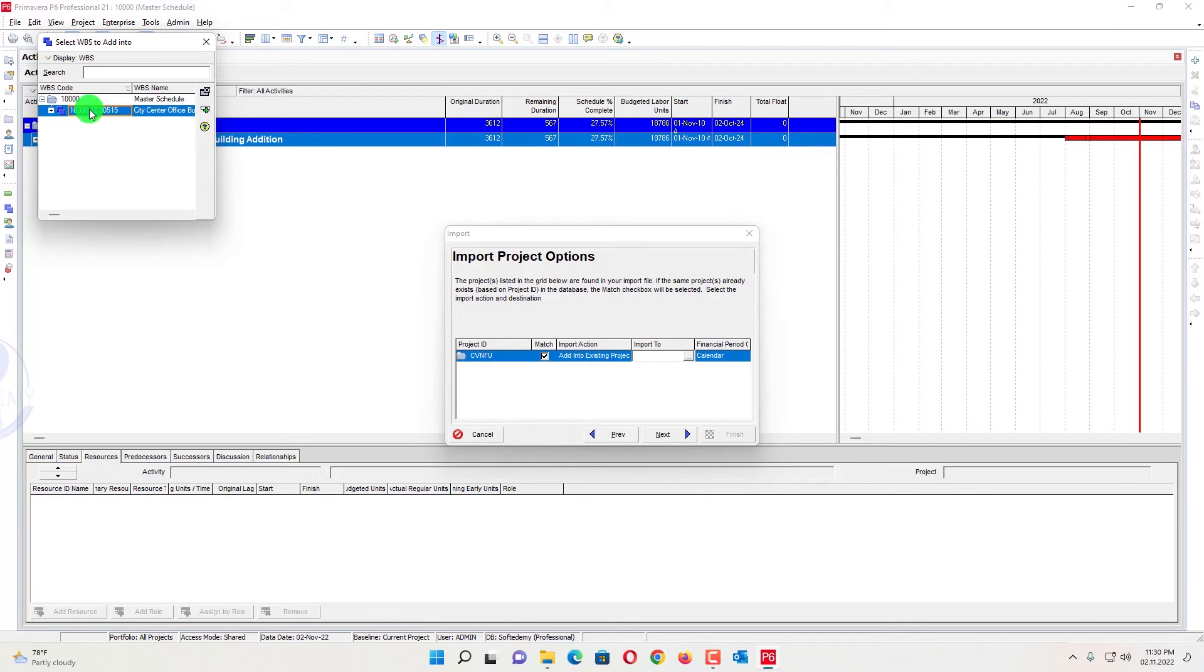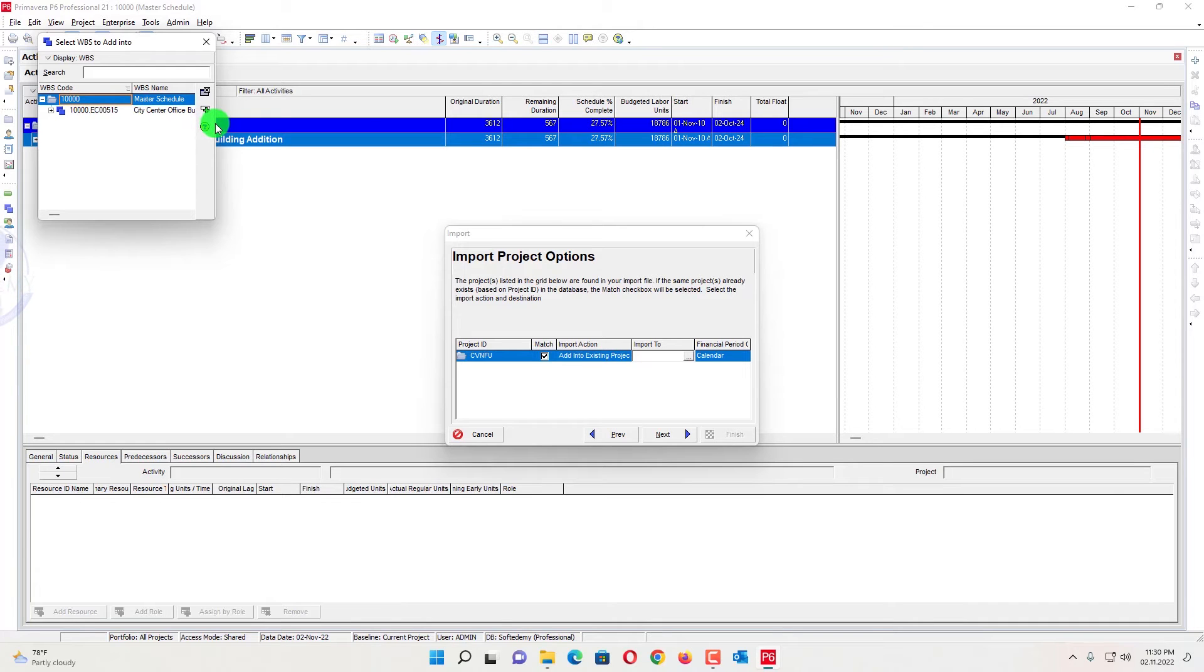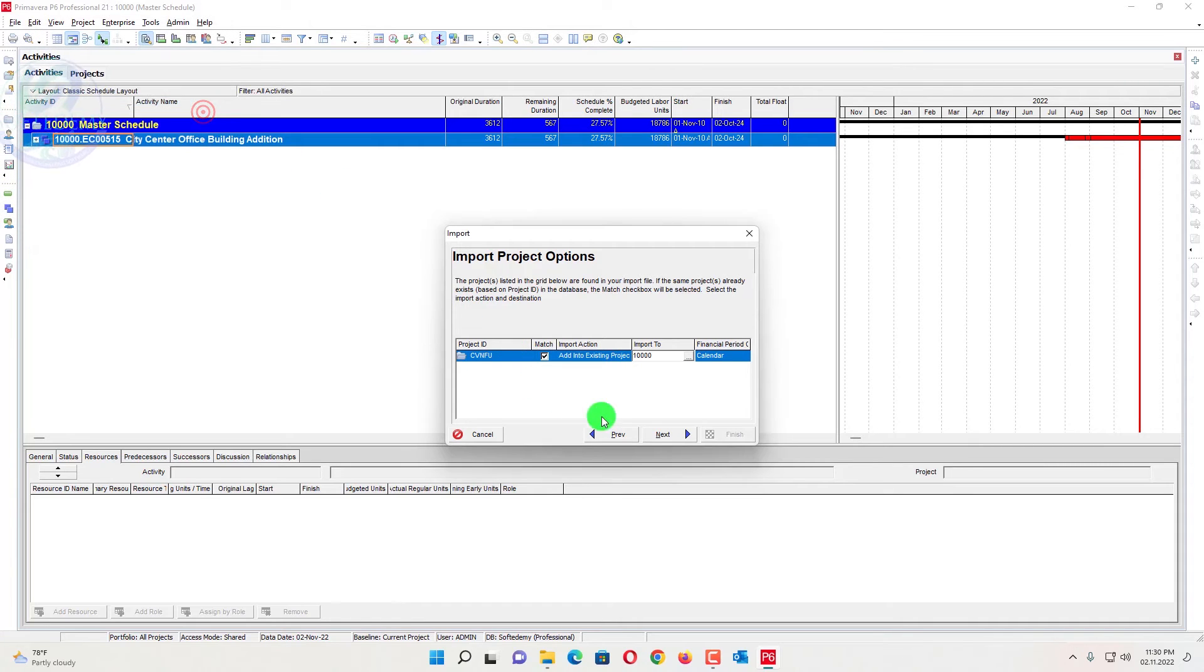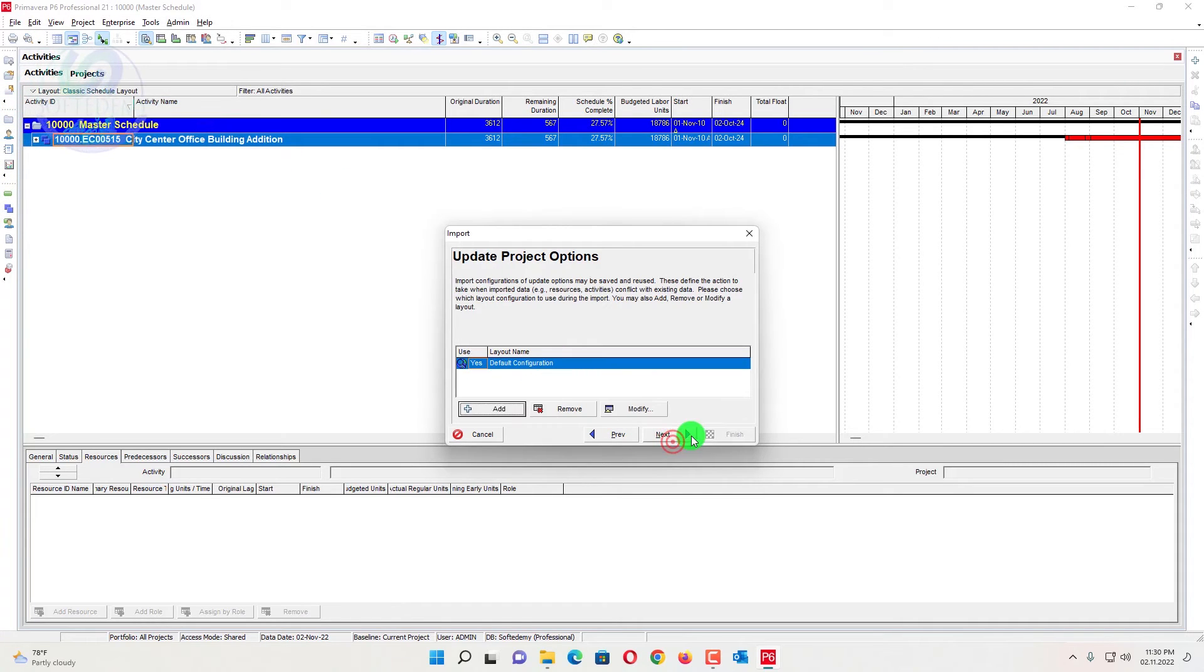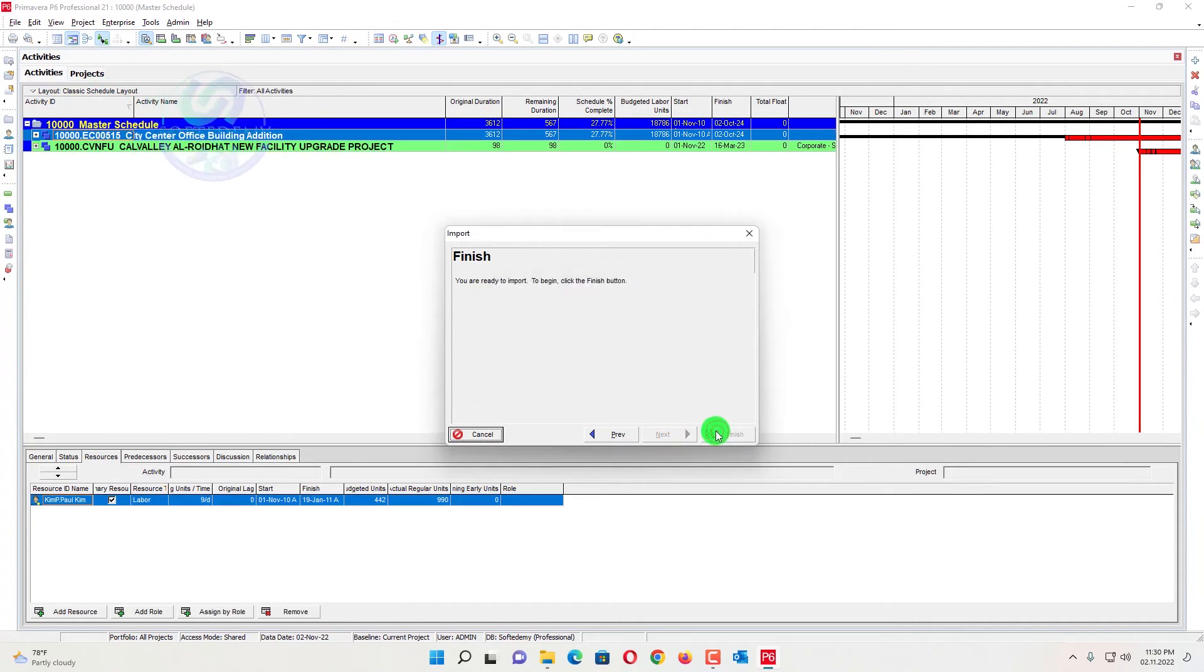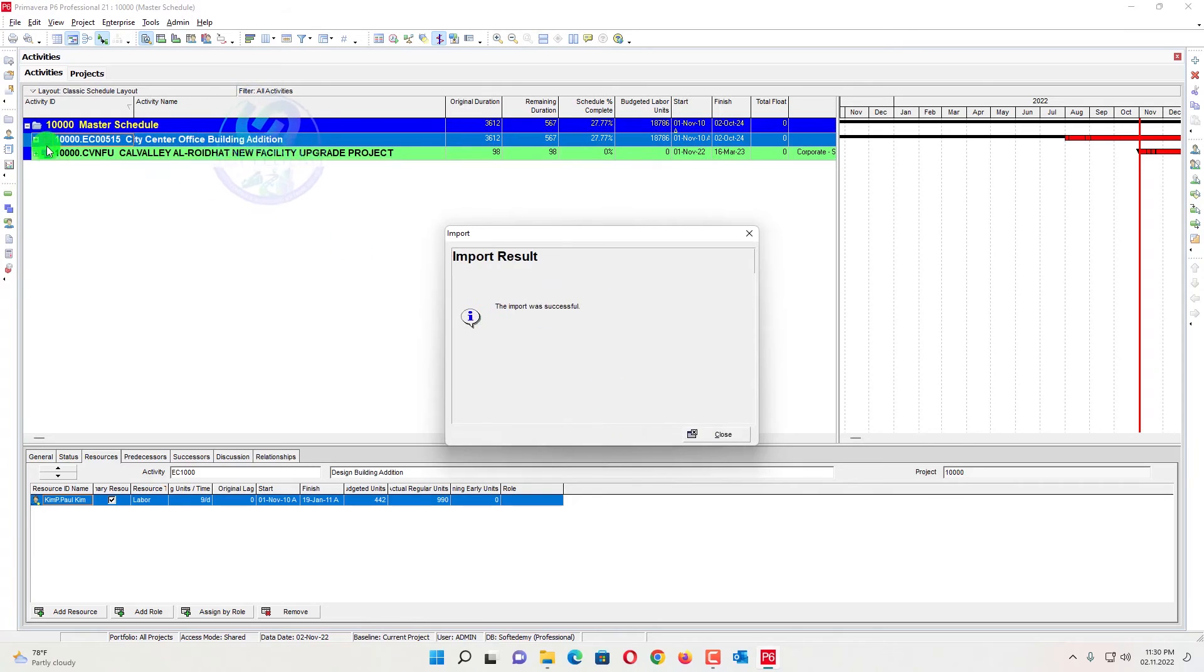And now I will select the WBS level. So I need to add that one in another WBS level. I will add here at the level of master schedule. So all the WBS will be below that one. I will just go here, add that one here. Next one, next, finish now. So you will see here the next project has been below this one.